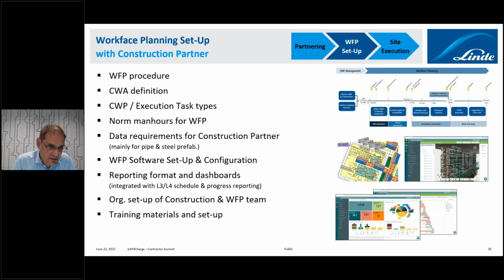If the construction partners do pipe and steel prefab, there we also need to align on some data requirements so that we can utilize graphical work packaging in O3. And then it's about the workplace planning setup and configuration, which is done together with O3 by us and the construction partner. Last but not least, reporting formats, dashboards, organizational setup. I will focus a little bit on the next slide. And of course, last but not least, training material and setting up and organizing the training.